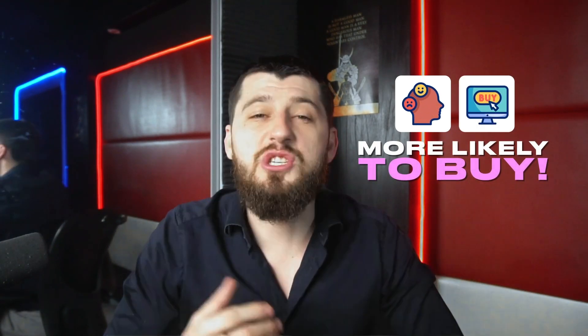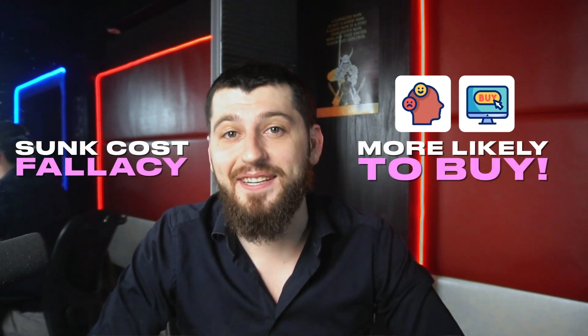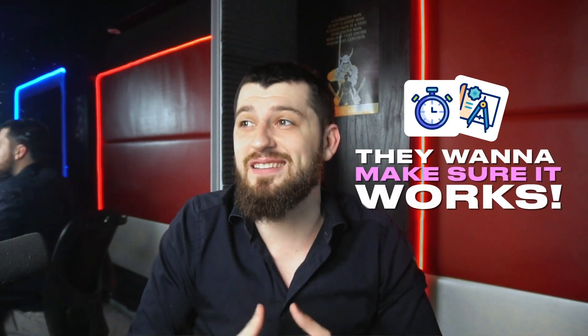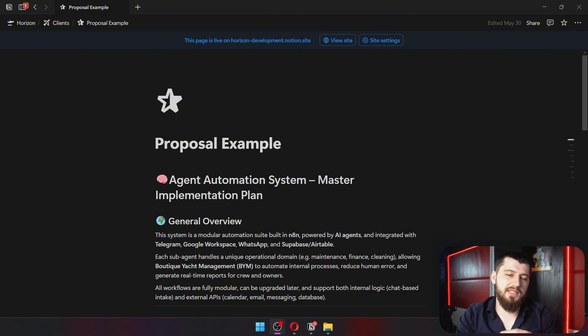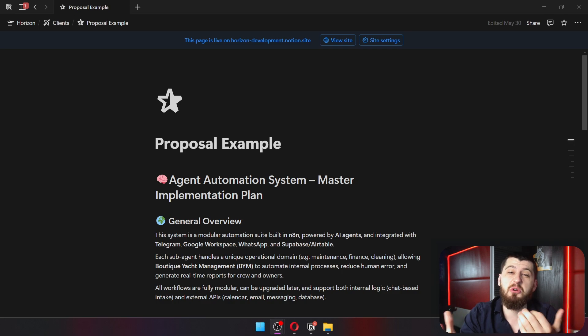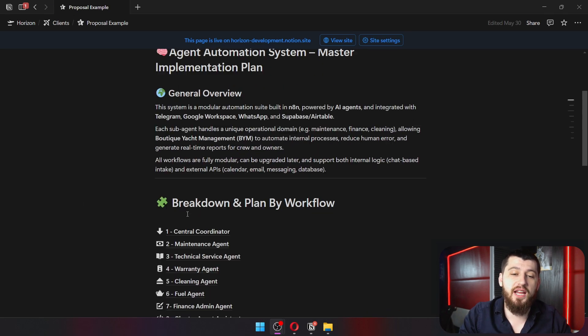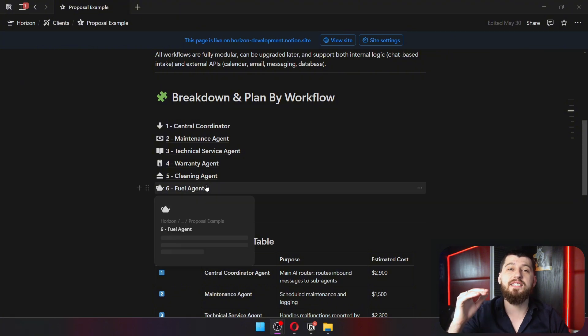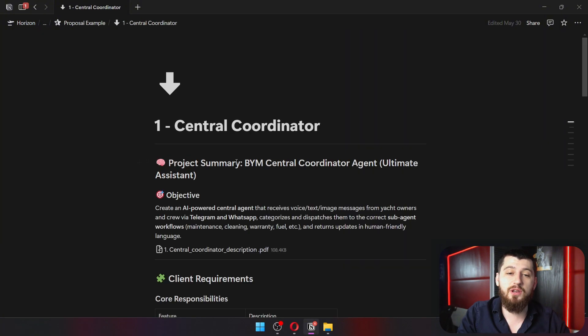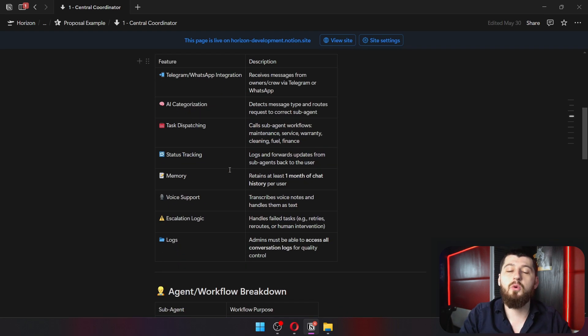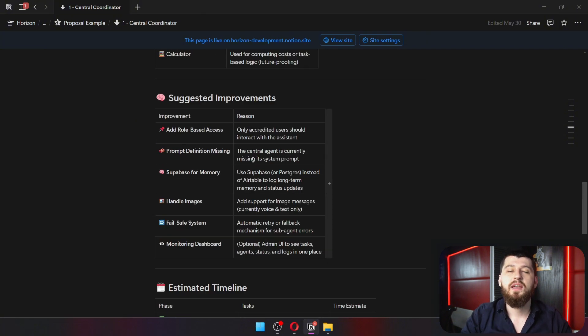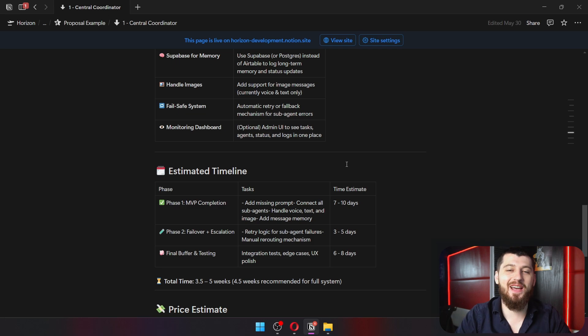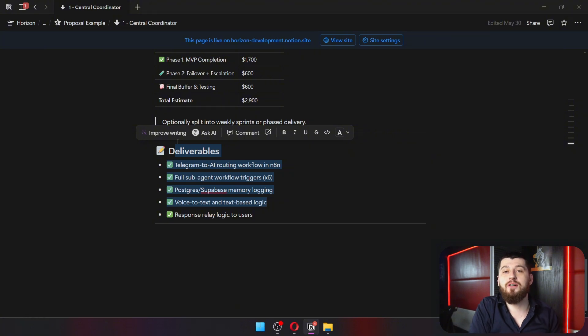Because of that emotional investment they will be more likely to buy due to something called the sunk cost fallacy, which basically means that they already spent a bunch of time working on this project so they want to make sure it works because otherwise all that time gets wasted. Here is an example of a project plan that I made. I did this using Notion. All it does is talk about the project and we break it down into nice little milestones. Each milestone has its own information about it, has its own description about what the task should do, how the agents should work, any improvements, an estimated timeline, a price, and the deliverables for that milestone.